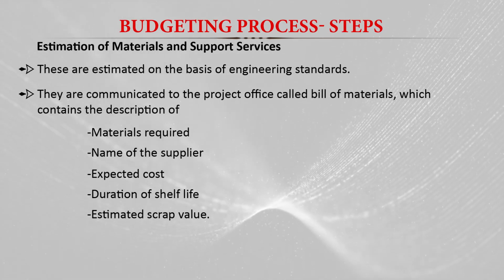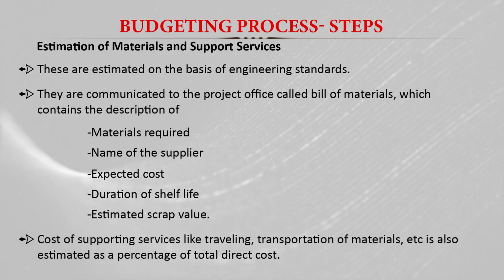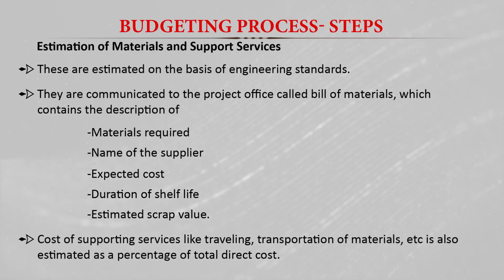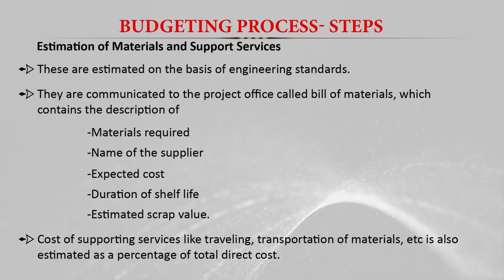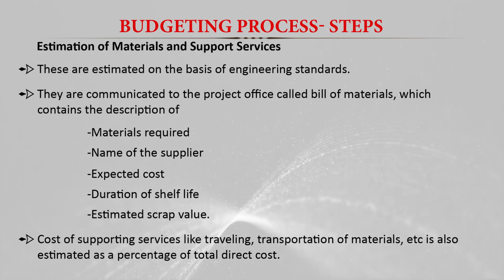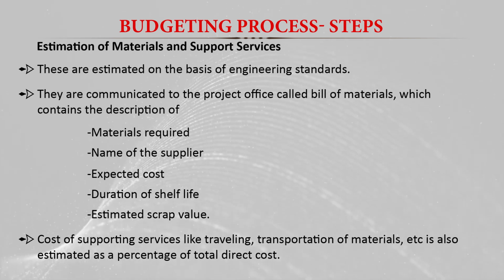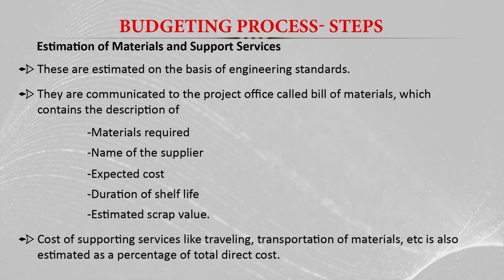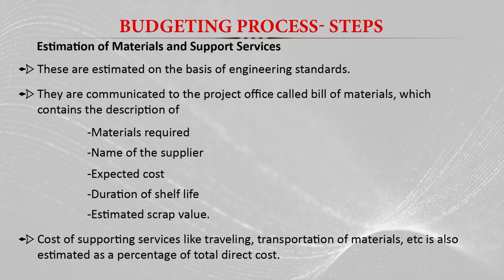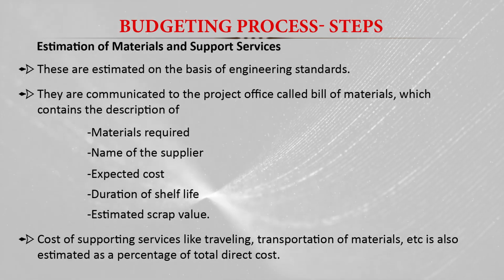In this step, we also have to estimate the cost of supporting services like traveling and the transportation of the material. When we use such different types of services, we have to estimate their cost, and sometimes this is estimated as a percentage of the total direct cost. Simply we can say 10% or 20%, based on the requirement. So sometimes it is simply a percentage of the total cost.